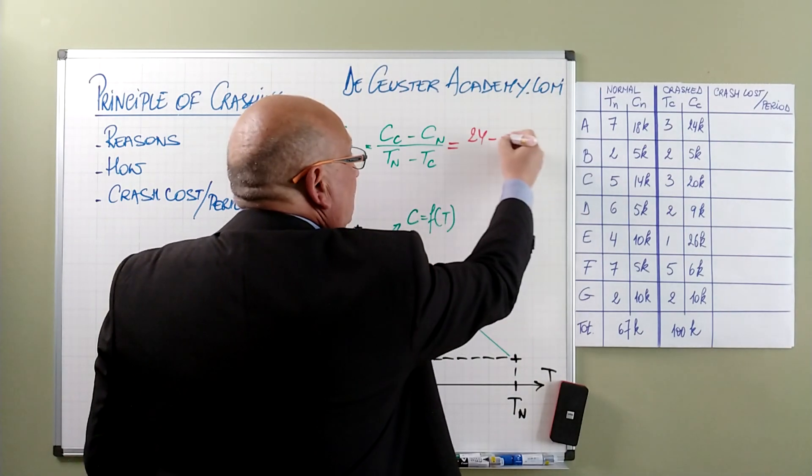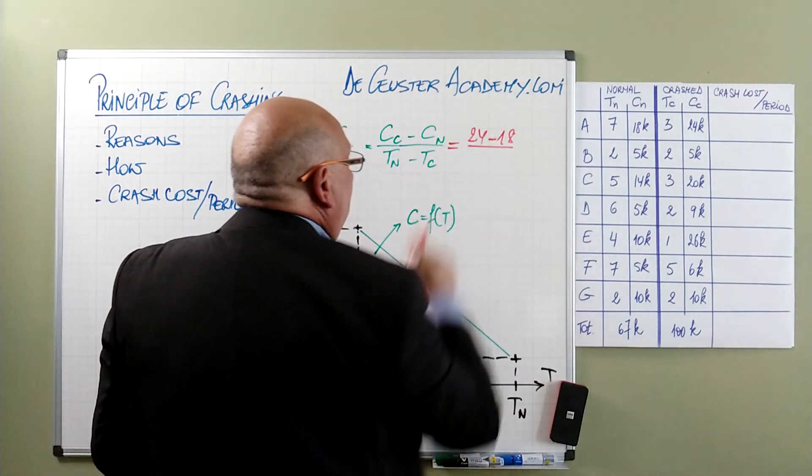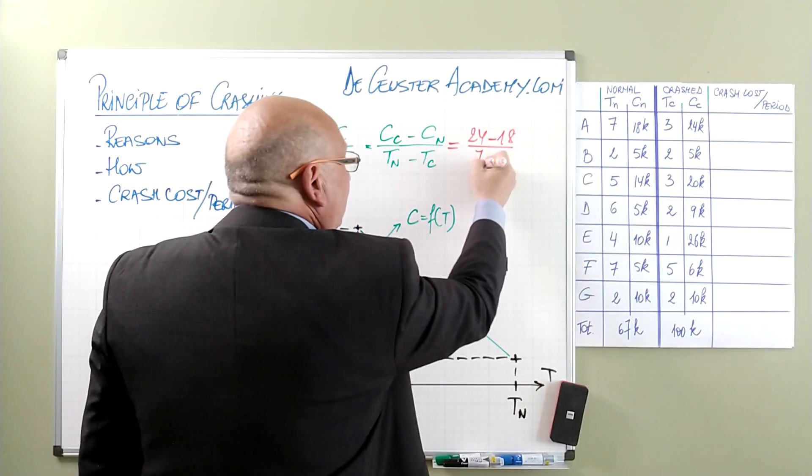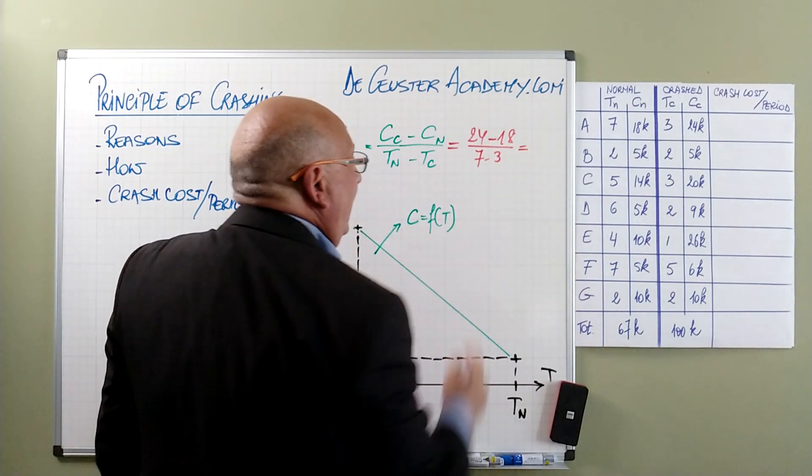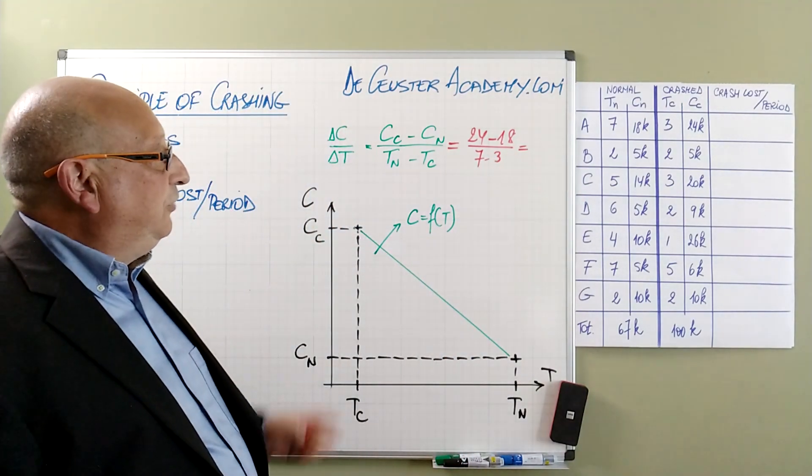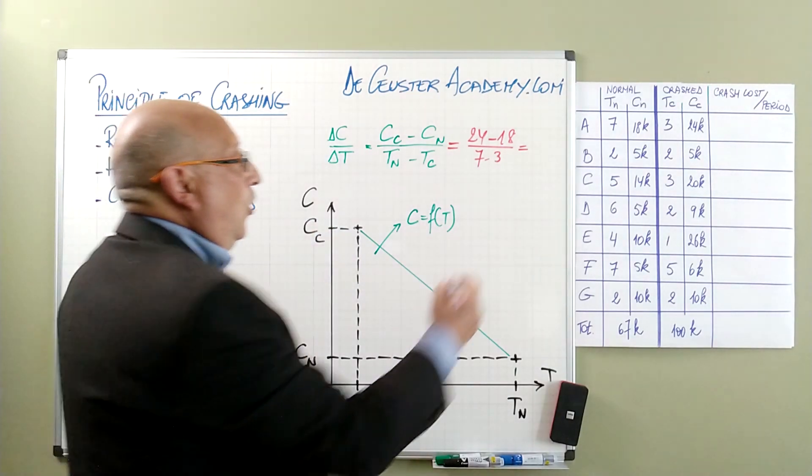A is the first activity and we know that the crash cost for A is 24, the normal cost is 18, and the normal time is 7, crash time is 3. So we find here a difference of 6 over 4.